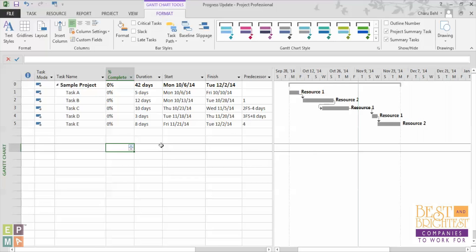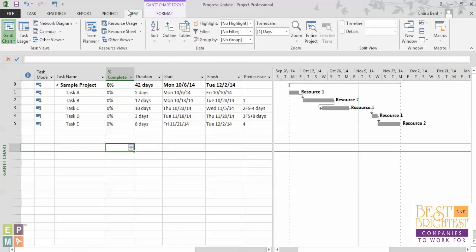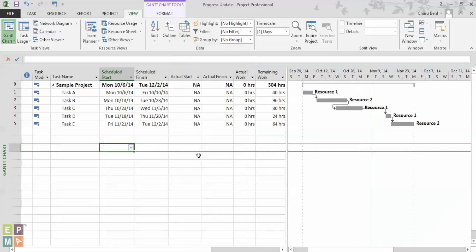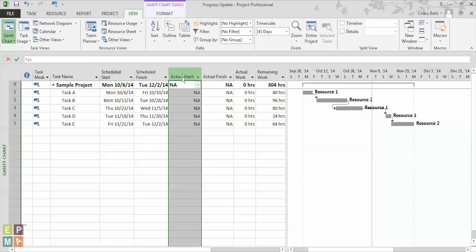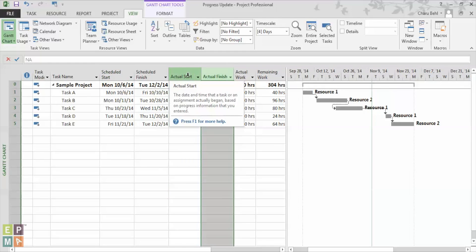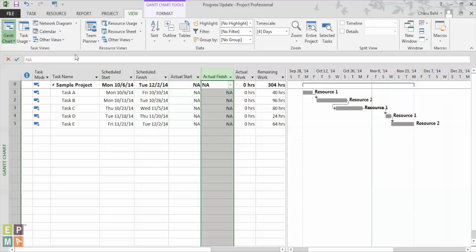Once I do that I would go under the view ribbon and under the tables drop down I would select the tracking table. Now here you would see the two columns called the actual start and the actual finish. A lot of time what happens is that due to schedule slippage your actual start date is different from what you had planned earlier and you want to make sure that the task is reported on time.